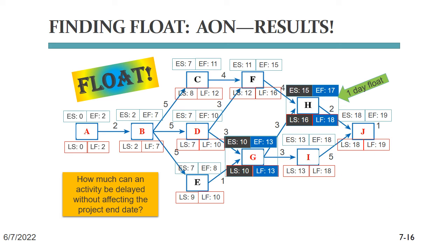This means that the project will still end on time, even if task F, for example, comes in a day late. Yay, float! Now let's look at task G. See the difference? Exactly. For task G, there is no difference between late and early start or late and early finish. In other words, task G is not allowed to be late.